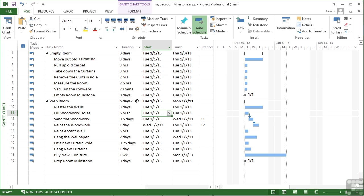Ideally, because in effect all of these durations are estimated. What you're doing with the estimated flag is saying, 'I'm really not sure at all what the duration is here.' I need to do some research, by myself or with my joiner, to determine how long it's going to take to fill the woodwork holes and put a more accurate estimate into that task. Simply add the question mark and that makes the task an estimated task.